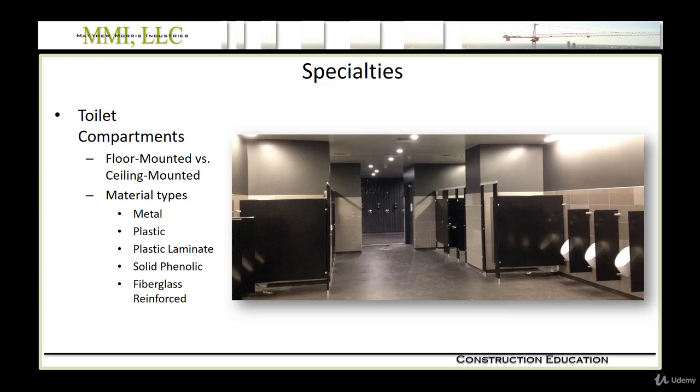Often what you're looking at in choosing a bathroom partition is durability, cost effectiveness, microbial resistance, ease of cleaning, graffiti resistance depending on where you're installing this, and recycled content. And of course the materials must be fire resistant. Again, I typically see powder-coated galvanized steel, but it could be any one of these options. In the photo you have two different types: a urinal screen, which is usually wall mounted as you see, and a toilet divider or partition. As you can see, this is installed after tile is complete.